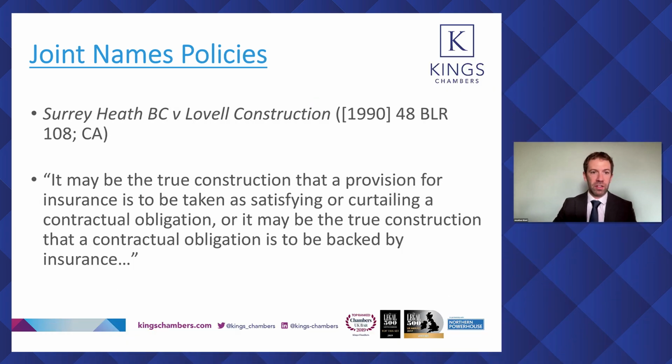I'll note in passing the decision in Surrey Heath and Lovell from 1990, which was mentioned in the CRS case, and in particular the quote on the slide was cited by the House of Lords in CRS. It may be the true construction that a provision for insurance is to be taken as satisfying or curtailing a contractual obligation, or it may be the true construction that a contractual obligation is to be backed by insurance. And that's really the nub of the issue in most of these cases.